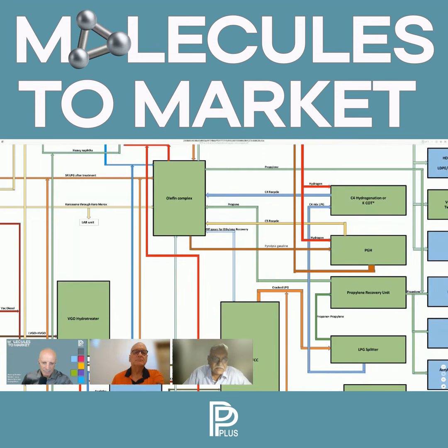This is a case for which also I need a board approval. The board can give me an approval that for the larger basket of the technologies I can go to one licensor. I don't have to do technology selection. I have some criterion, which, frankly speaking, is more of strategy, and select a licensor. For example, Petrobras, if they put up a refinery complex somewhere, they might say, okay, I will go and give everything to UOP.